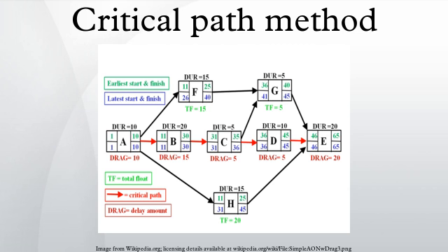In this diagram, activities A, B, C, D, and E comprise the critical or longest path, while activities F, G, and H are off the critical path with floats of 15 days, 5 days, and 20 days respectively. Whereas activities that are off the critical path have float and are therefore not delaying completion of the project, those on the critical path will usually have critical path drag, that is, they delay project completion.